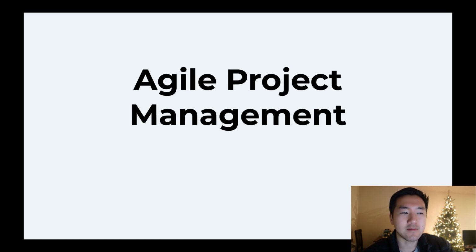So an example of this can be, let's say if you're working on a certain type of software that you're delivering to a customer. A lot of times, especially in SaaS, in other words, software as a service, the software is customized to the customer's needs, and if it's a very custom software product, you don't want to go from 0 to 100 and just have it completely built without having your customer's feedback, right? So maybe when you go from 0 to 10, that's when you pause and you have your teams demonstrate, show the progress you're making, and get feedback from your client.